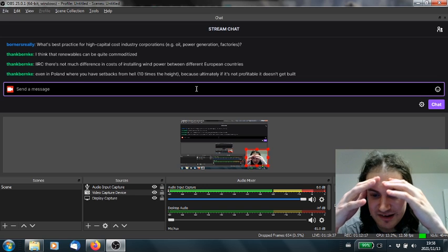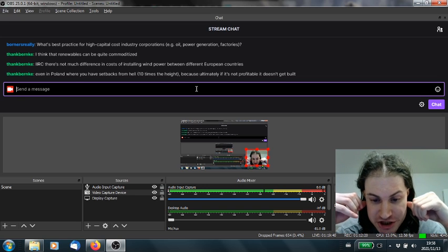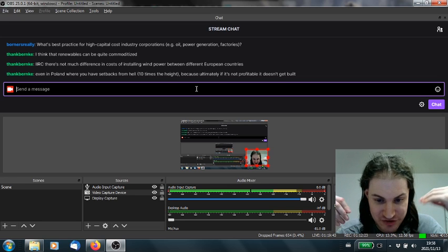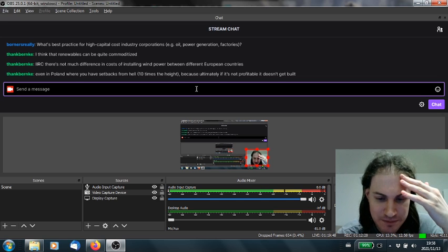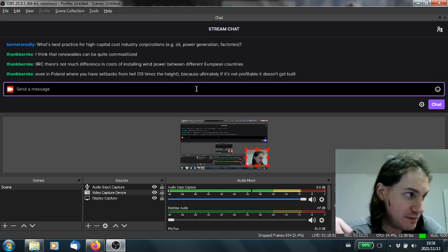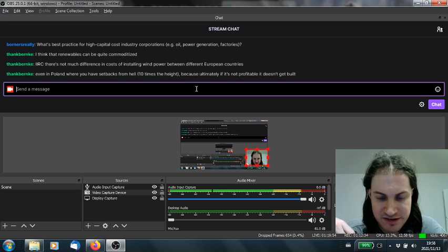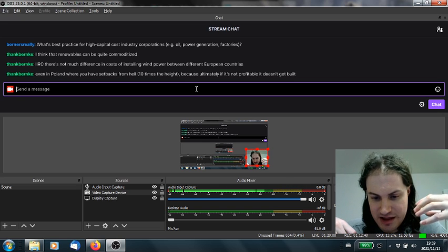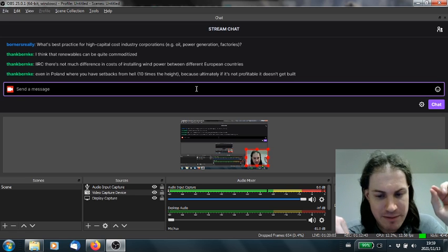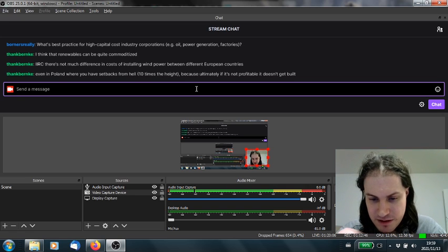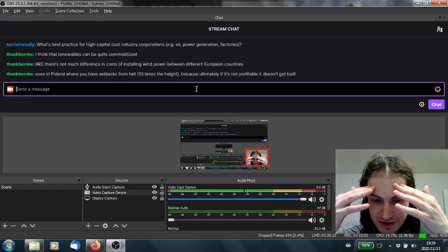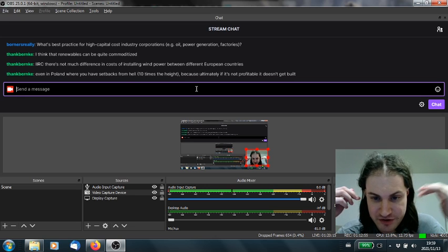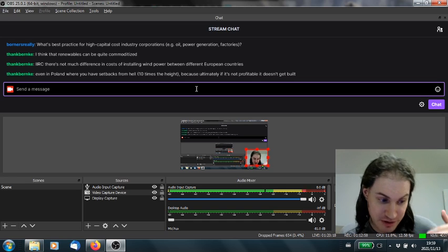So Turkey has a dazzling array of construction firms because Turkey does a dazzling amount of construction. So housing and infrastructure, Turkey is incredibly YIMBY, and this has helped keep a lid on costs. They have a housing surplus in Istanbul, at least as of pre-corona. And what this means is there's a law in Turkey that says minimum 3 bidders per contract for infrastructure. If you don't get enough, you have to do a rebid. And that's fine because Turkey has about 5 trillion construction firms. There's lots of infrastructure being built in Turkey.